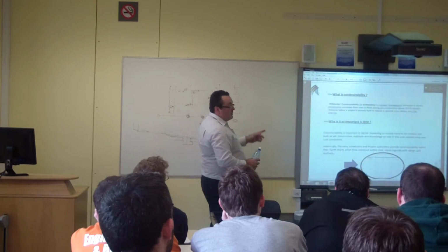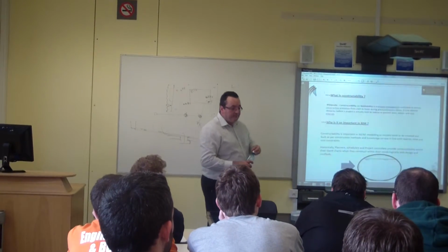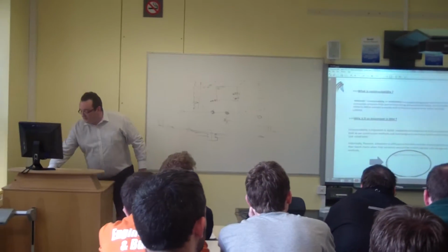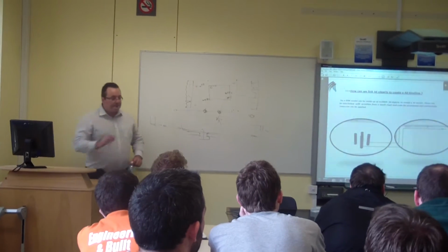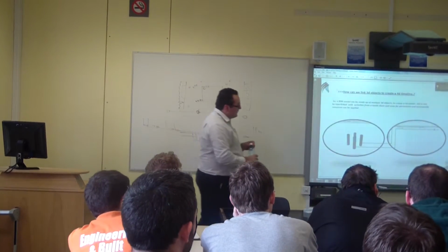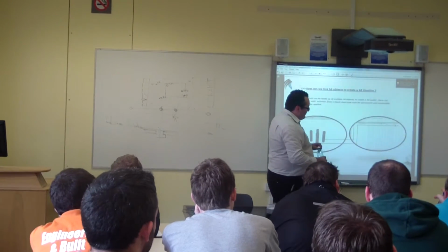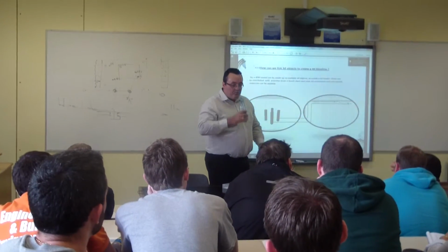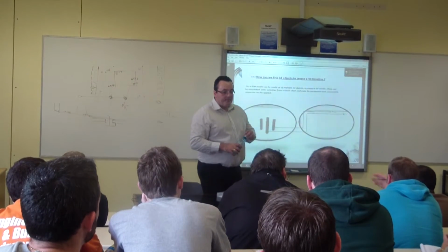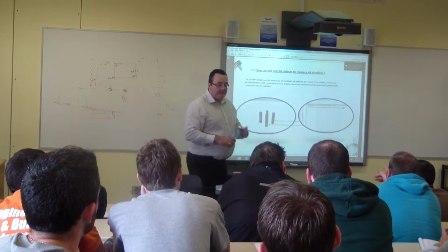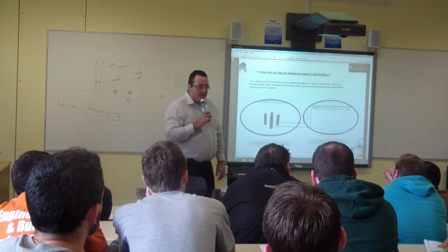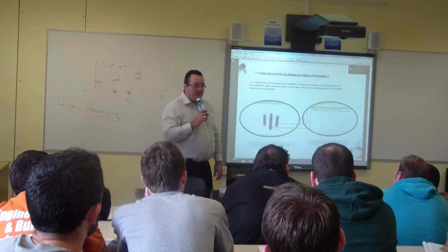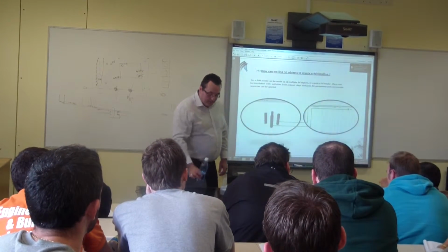So when you've got that time aspect, when you've got that 5D, and you've got a delay on that, you've obviously got a final completion date on your time aspect. Now, if you were overrunning, and you've got a delay clause, and you've got a payment per day for a delay, will that kick in then into your cash flow? Yeah, it'll deduct one from the other. If you're over by a couple of days.